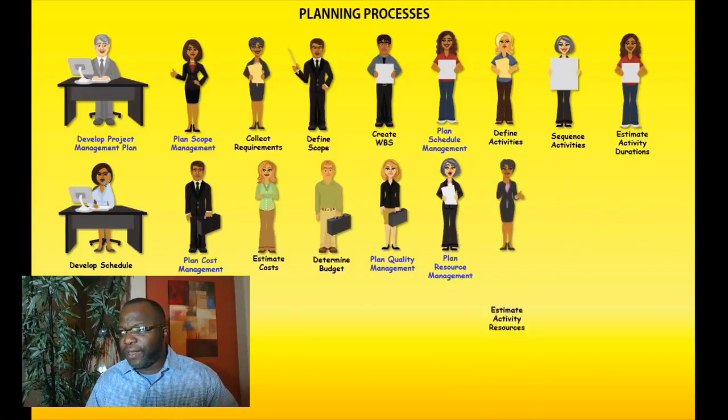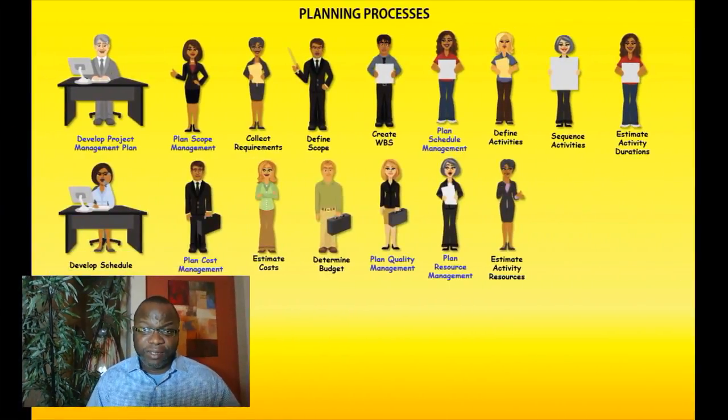Our next process here is called estimate activity resources. And this is where we estimate the resources needed to complete the project. How many people? How much equipment? How many supplies? What kind of facility? What should the facility be able to accommodate? And so on and so forth.